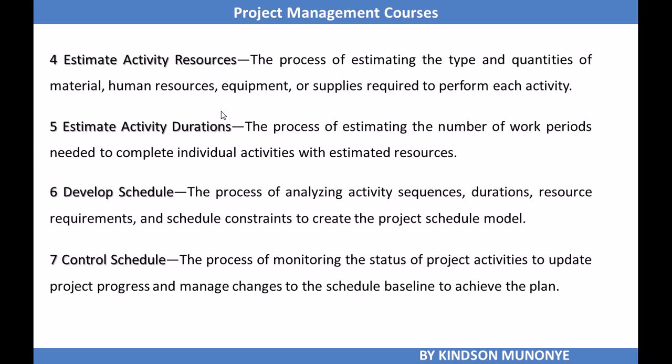Then comes the develop schedule process, a very important process that analyzes activity sequences, durations, resource requirements, and schedule constraints to create the project schedule. When the project schedule is created in this last planning process, it will now serve as a baseline against which project performance will be controlled and monitored.